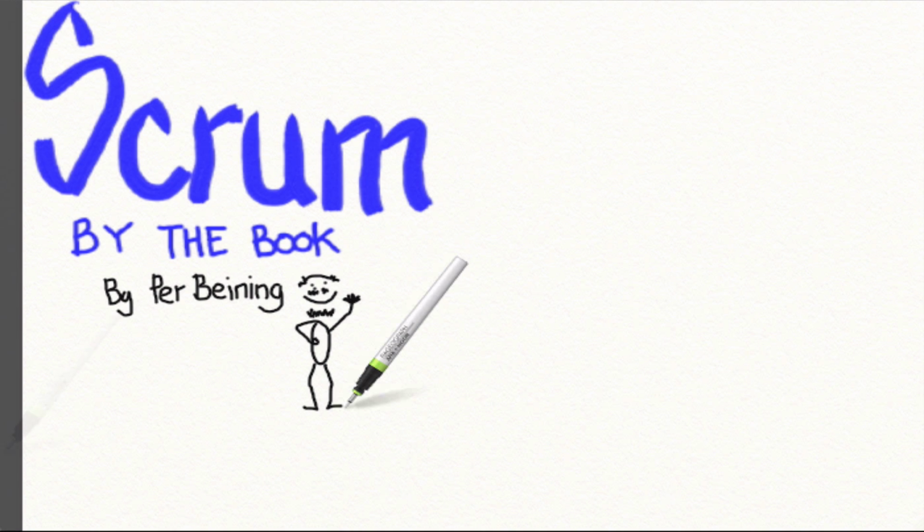Please enjoy! Scrum is an iterative, incremental approach for delivering complex products. The iterative part consists of the main iteration, which in Scrum is called a sprint. It's time-boxed and has a duration of 1 month or less. Another iterative part is on a daily basis, which in many drawings of the Scrum process is placed here at the top.